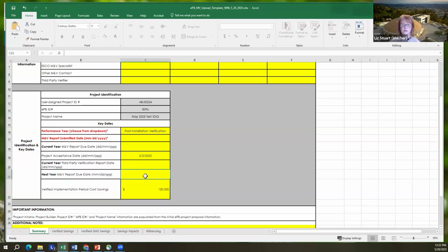So if you fill in the next year M&V report due date, let's say our current year, let's say today's the date, 2025, just making up numbers here again. Next year, it's going to be due on 5/20/2026. Now, if I upload this to my project, it's going to ping me by email, I believe 2 months before that M&V report is due. And then again, 2 weeks before it says, hey, you have an M&V report due. So this is a really cool and very useful field that's going to ping both the project initiator and the ESCO when the M&V report is due.